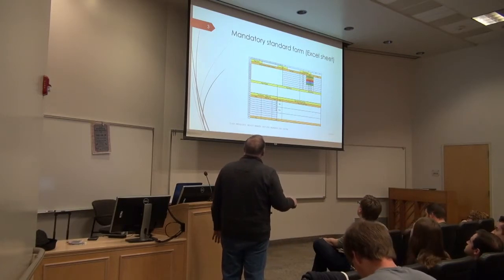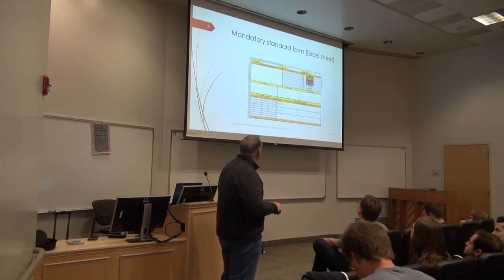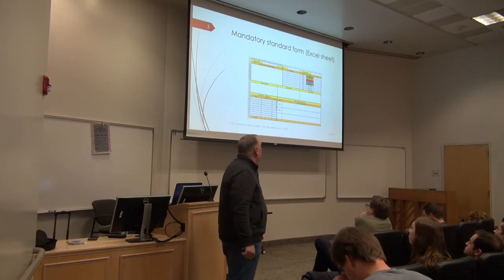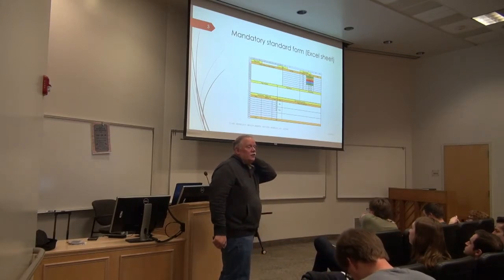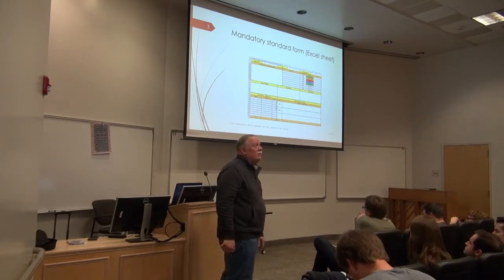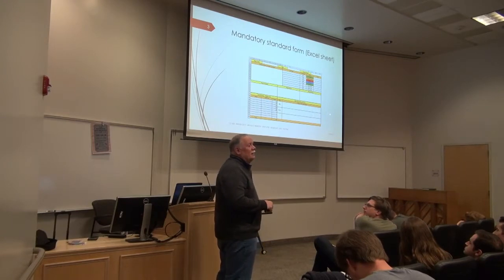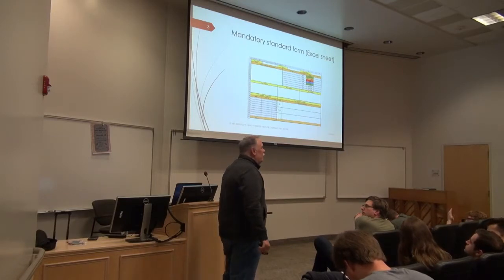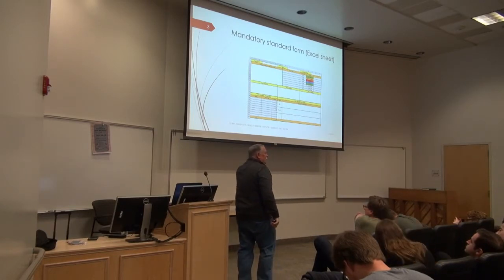Now here, each week, each member of your team is responsible for reporting how many hours she or he put in on the project that week. My recommendation is that this cover Saturday through Friday. Since you have to submit this Saturday night, have everyone give you their hours through end of day on Friday, so you're not trying to gather people and people are still coding at 11 o'clock on Saturday night saying, wait, I have these times.